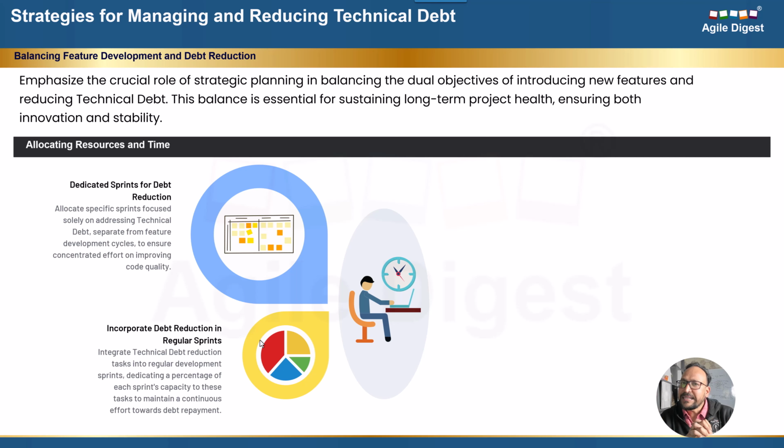Now, if you are working on sprints, maybe you may not need to allocate these particular technical debt slices at the very beginning. Maybe after 4 or 5 sprints, you realize the technical debts have started accumulating. Then you start those allocations. Maybe your target is to reach up to 20% of your capacity. Maybe in the third sprint, you need 5%. Then you increase it to 8% or 10% based on the current amount of technical debt, where you will be reducing feature development and increasing your allocation to technical debt.